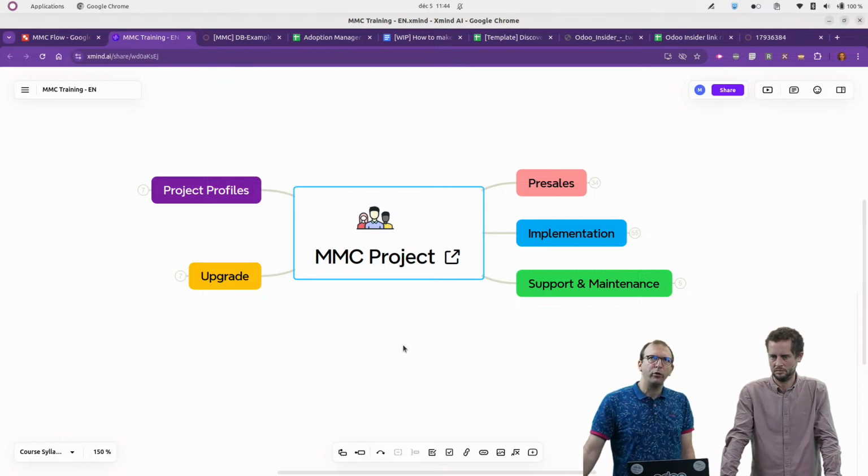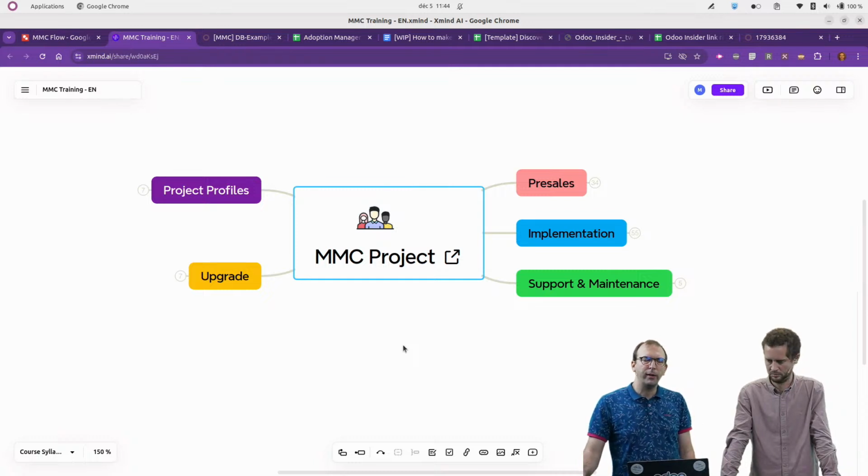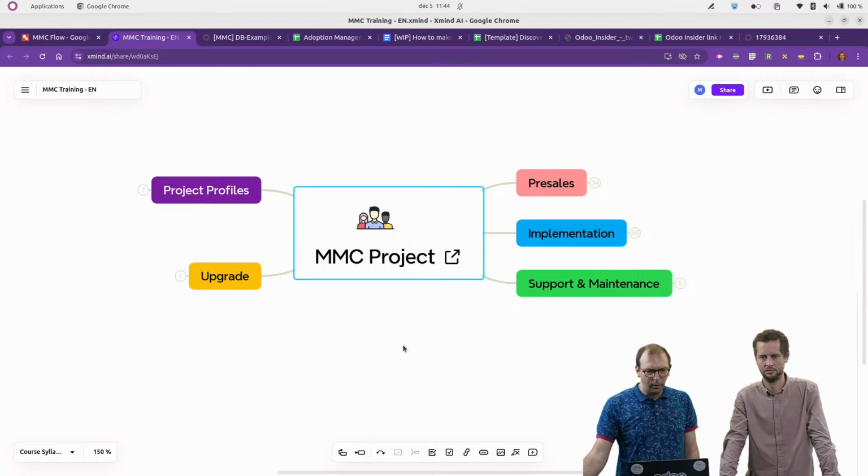On some projects where we see a risk that it happens, we also do proactive monitoring in the Odoo database to see whether they are actually using it, and whether they are using it well. If there are deviations or things not done correctly, we can still fix them and make sure that the trainings or documentation are updated. Those things can be done fast, and we don't wait months before realizing that they are not using Odoo correctly or not using it at all.